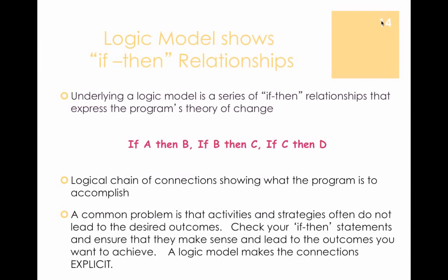When you look at a basic logic model, the most simple logic models are going to have at least four components: inputs, activities, outputs, and outcomes. That's your most basic logic model. When we're talking about inputs, these are the resources that are going to go into your program. This is your staff, your funding, your curriculum, your supplies. If this was a recipe, it'd more or less be the ingredients. So, what are the ingredients necessary for you to develop this program?